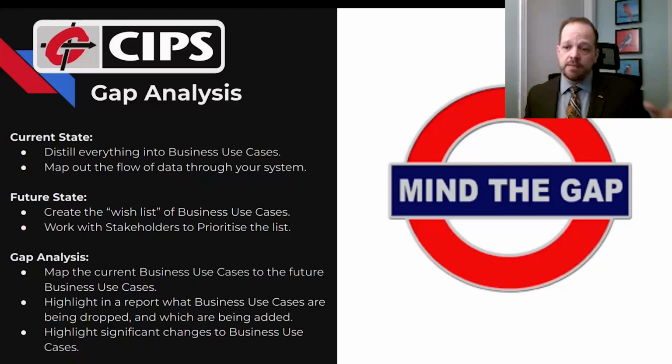They were there to keep the lights on until the mainframe turned off. A gap analysis identified that they did not have the skills to maintain the cloud infrastructure. We did our gap analysis, and the business said, well, they're all ROCs. We don't care that they don't have the cloud skill set, because once this project's done, they're going to say thank you very much, and they're going to go to the retirement homes, and they're going to completely forget about ever working again. So we'll sign off that this is not a deficiency. This does not need to be included in the gap analysis.